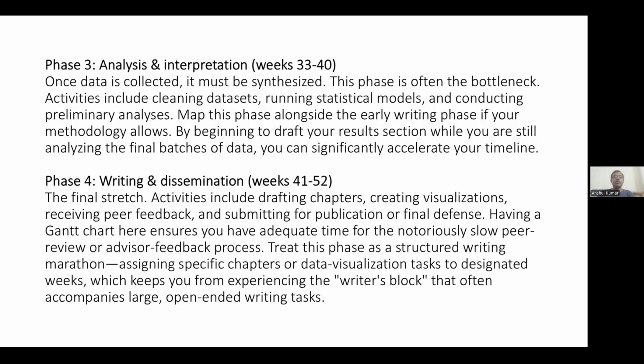By beginning to draft our results section while we are still analyzing the final batches of data, we can significantly accelerate our timeline. Phase 4 is the writing and dissemination, from week 41 to 52. So this is the final stage. Activities include drafting chapters, creating visualizations, receiving peer feedback, and submitting for publication or final reforms.